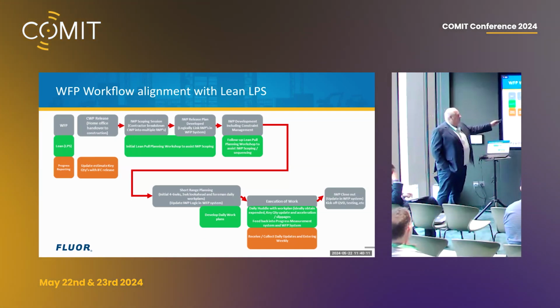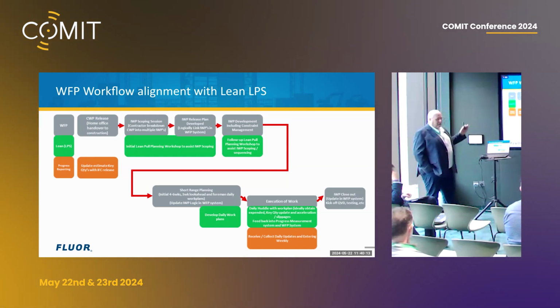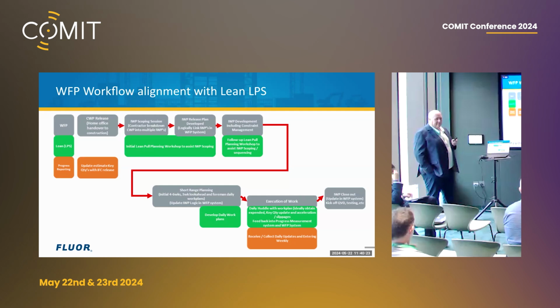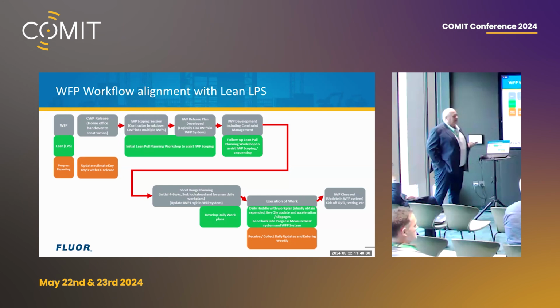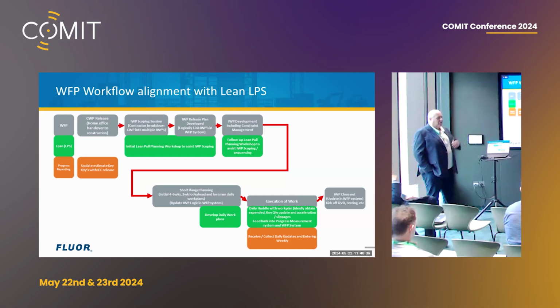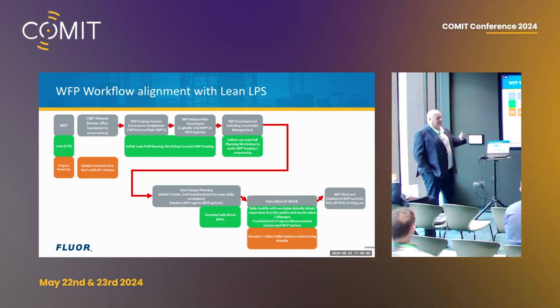The bit I forgot was progress reporting. We have to do an estimate on our jobs at the start. All clients want a price of what it's going to cost. Now, when the project develops, goes through its journey, that price is changing. They don't always want to pay for a full estimating team to re-estimate. So by having the CWP release, we're getting new quantities, real quantities that they're going to install. So we're not going to get our contractors to overcharge us. We know what that is before they've installed it.